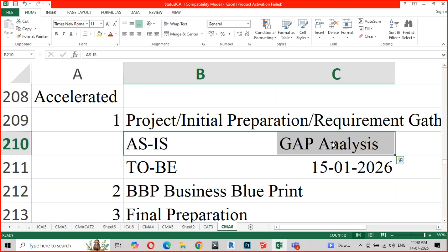Now, the first step of the SAP project has happened. So both the companies are happy and they have decided that they have to go ahead with the SAP project. Now, as a second step, what is the second deliverable? A document is prepared in the second phase of the project discussion. There is a Bible, also called the Bible of the project. This is called a business blueprint.